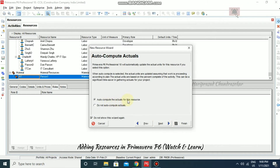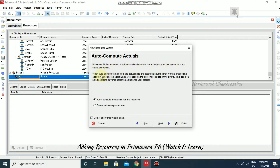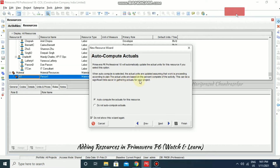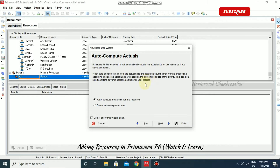Here you can set auto compute actuals for this resource, or go for 'don't auto compute actuals'. In Primavera P6 Professional, it will automatically update the actual units for this resource if you select this option. When auto compute is selected, the actual units are updated assuming work is proceeding according to plan, based on the percent complete of the activity. This can be a significant time saver. If you want the total cost of your project, you can go for auto compute and it will automatically compute the cost and show you the result. I'm selecting auto compute actuals and clicking Next.